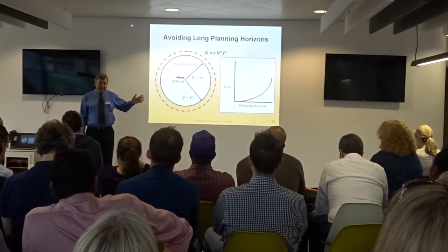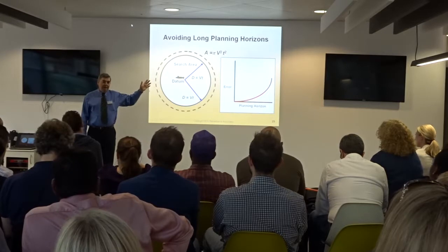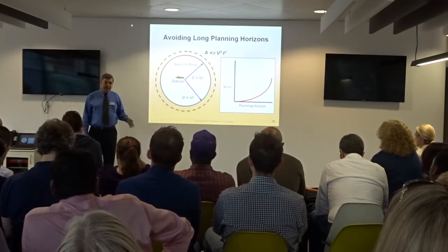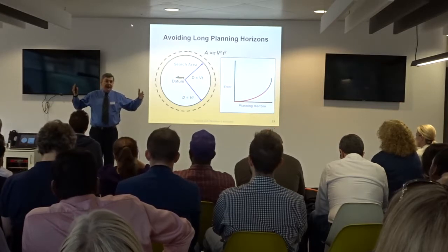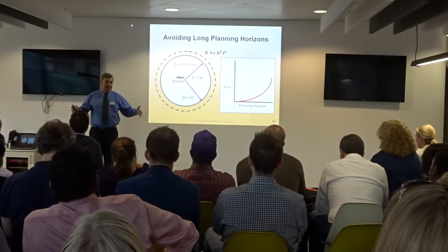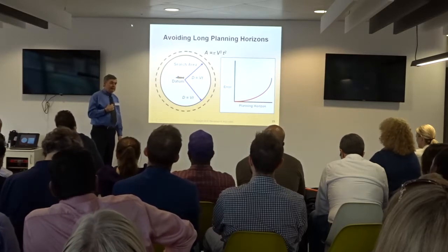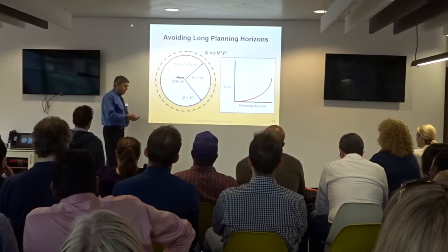And the interesting thing is when you look at the long cycle times, what you find is the majority of that cycle time is not, in fact, time when engineers are working. The majority of the cycle time is when work product is sitting idle because of the queues that you have on the critical path of your development program. So you just absolutely kill your ability to have good requirements when you end up having long cycle times in the process.